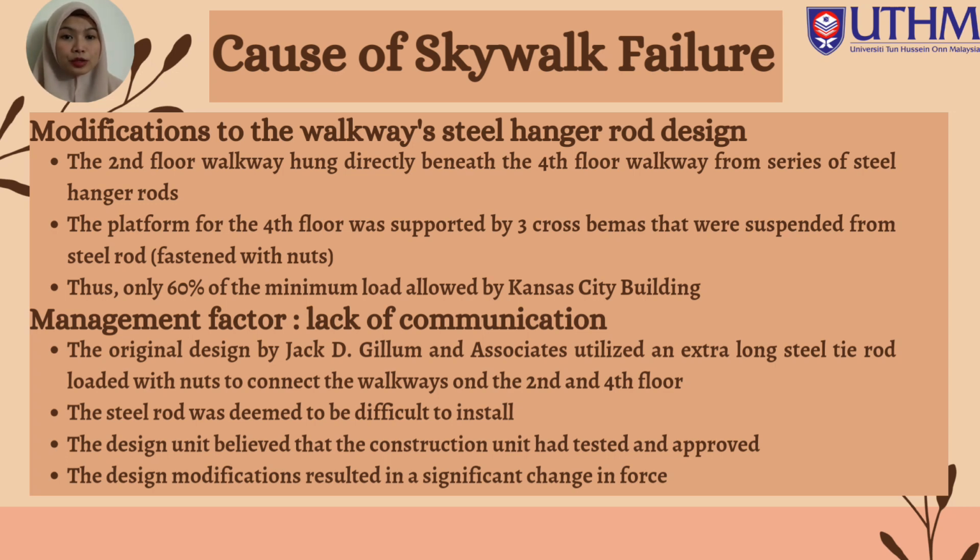The steel tie rod, however, was deemed to be difficult to install by the construction units. The design unit believed that the construction unit had tested and approved this drawing in accordance with the conventions, thus it had stamped an approval seal. Thus, this design modification resulted in a significant change in force, and the issue gets worse when there is a lack of communication between the design unit and the construction units.